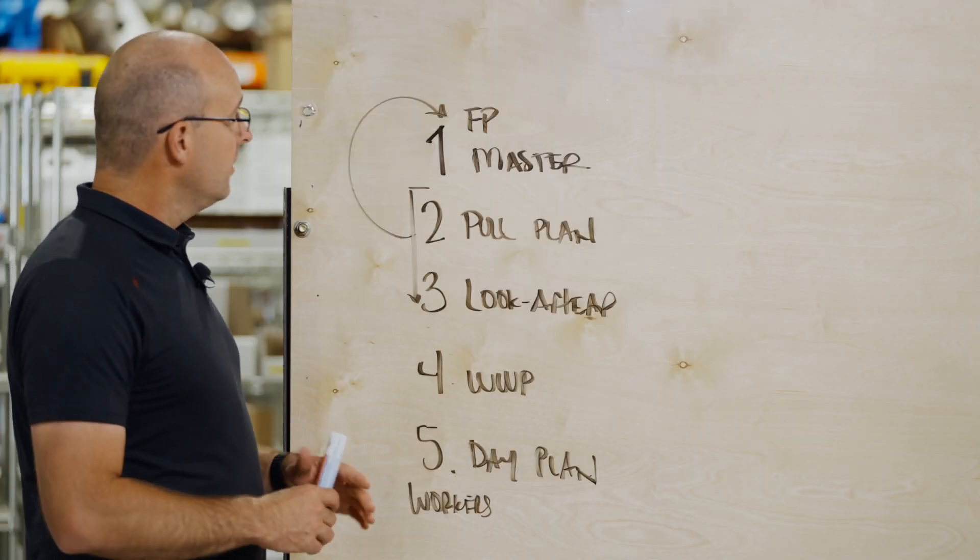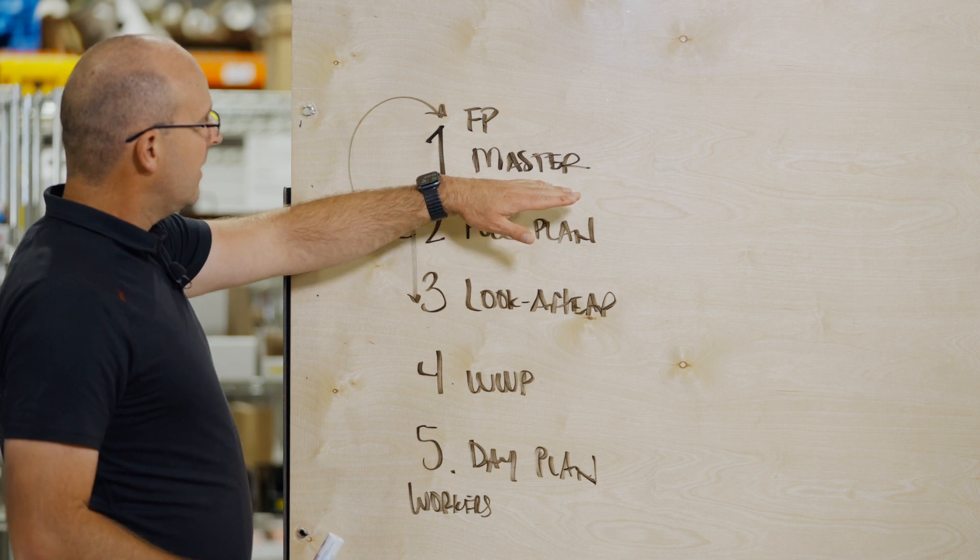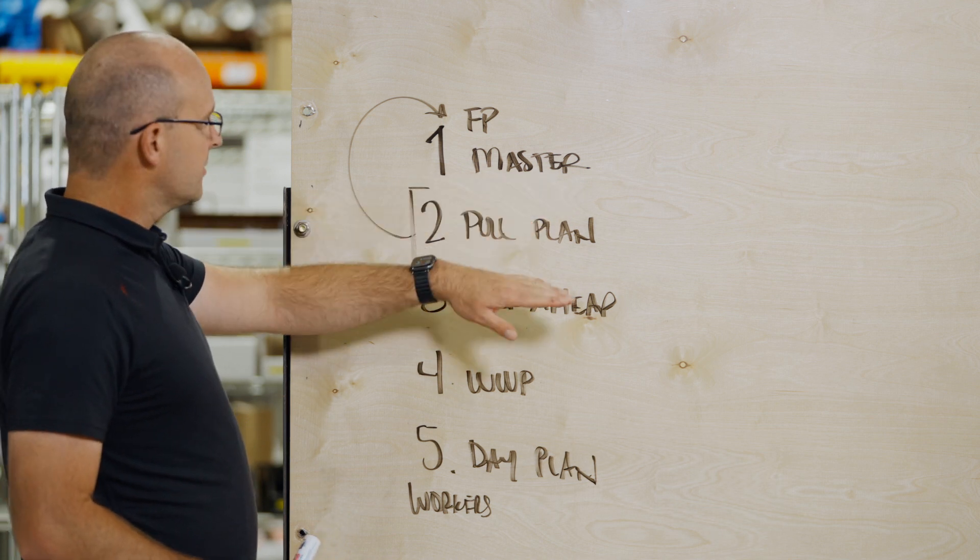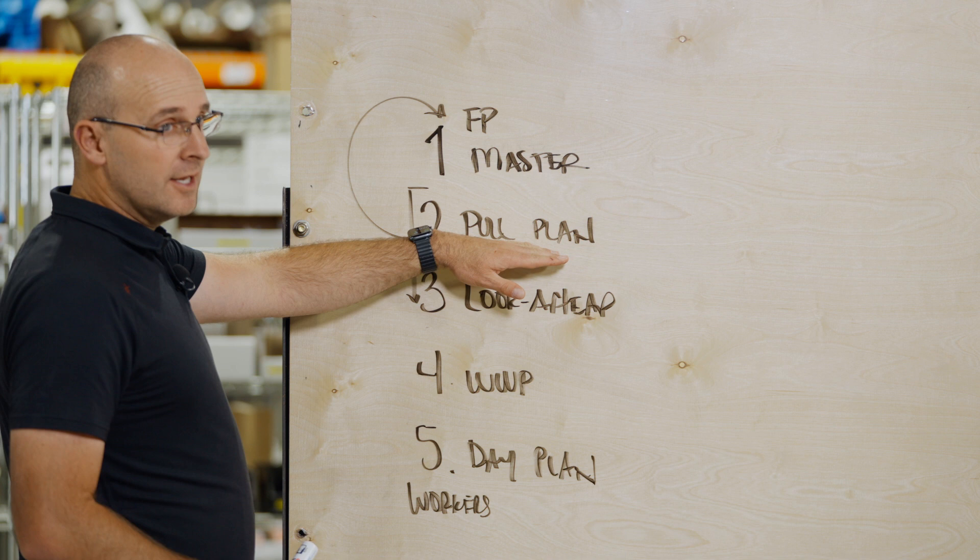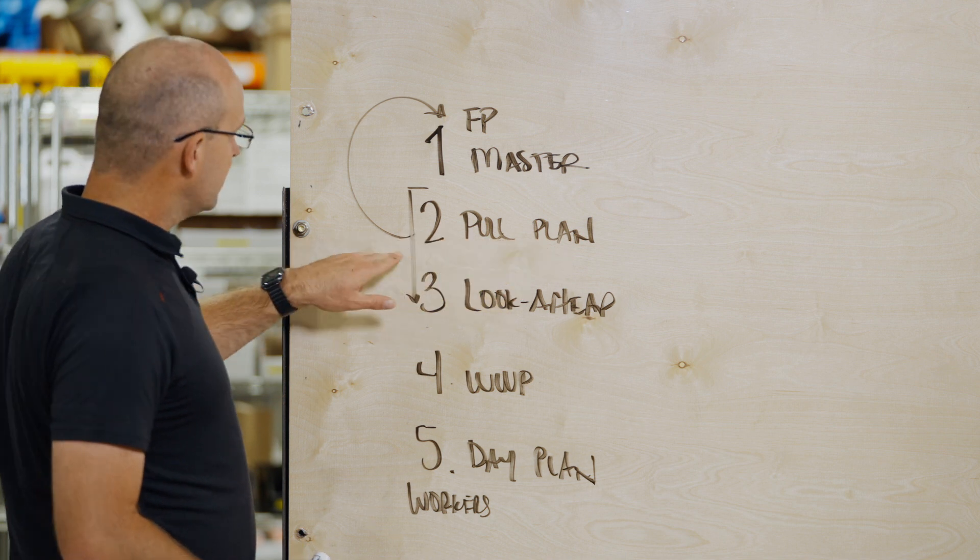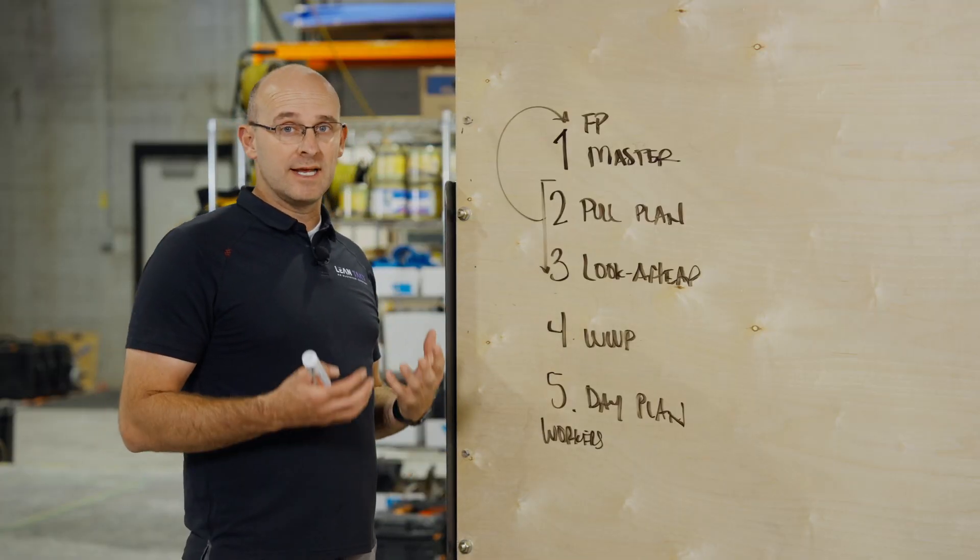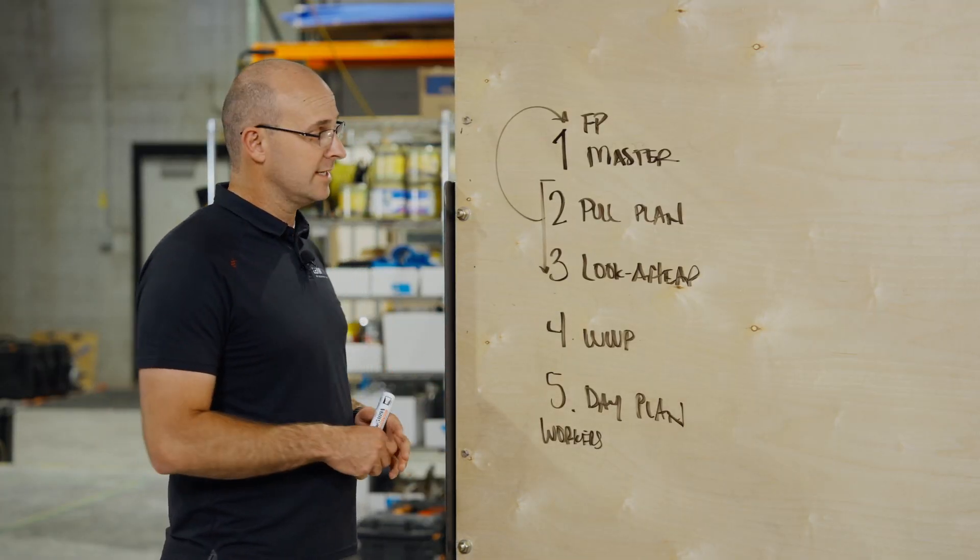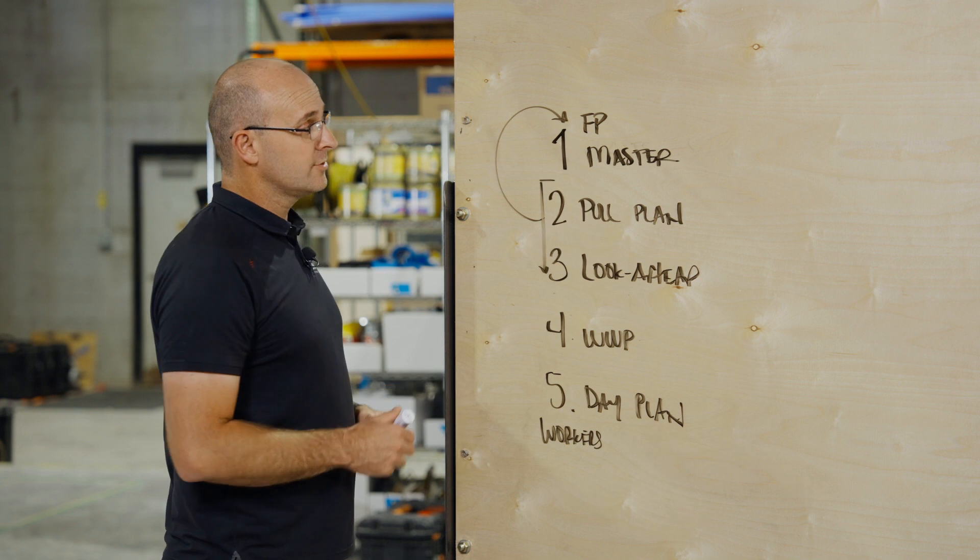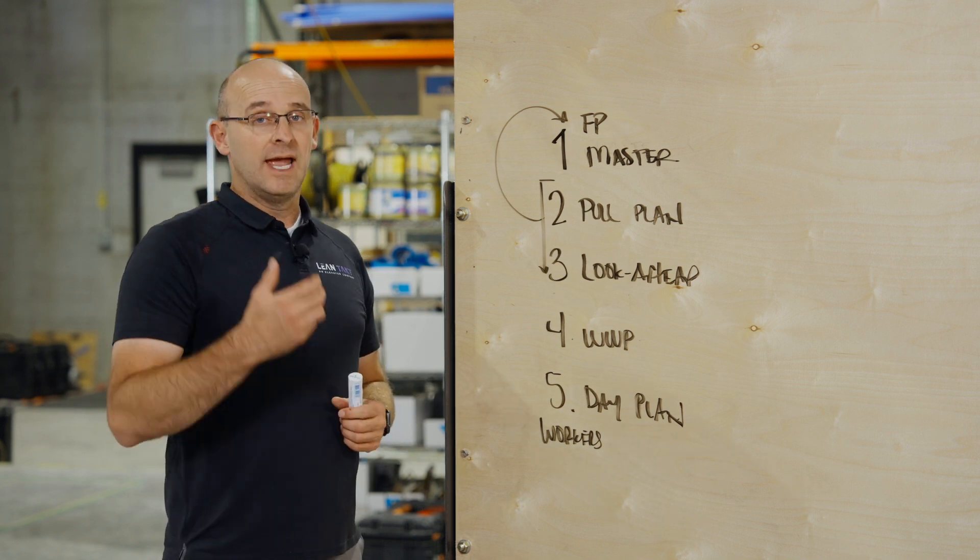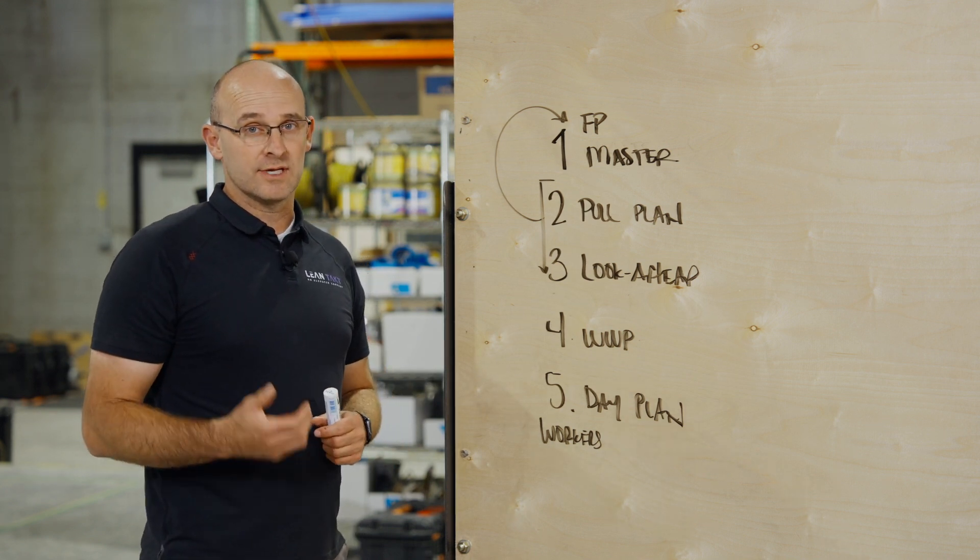Okay, so number one, we're going to want to have our master schedule. Number two, our pull plan. When we do that, we'll always come around and educate that master schedule and update those TACT sequences. Because your master schedule will always be a TACT plan and then summarized in a CPM schedule if you need it.